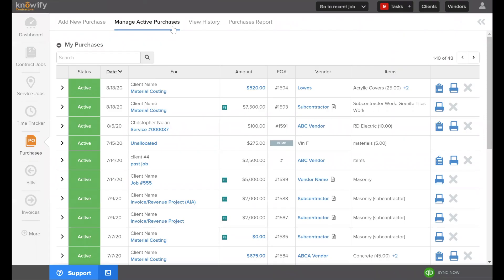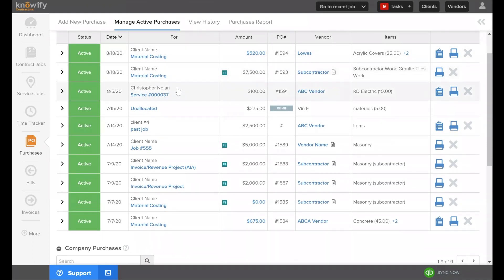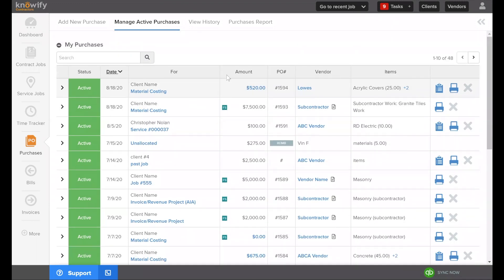Here on my screen I'm going to start off in the Purchases section. Each webinar covers a different topic, so we're jumping straight to managing costs and purchases. Under the Manage Active Purchases screen, active purchases are ones I've created where I've logged that the vendor or subcontractor will invoice me at a later date — so technically all of these are still open with a balance because I haven't yet been invoiced.